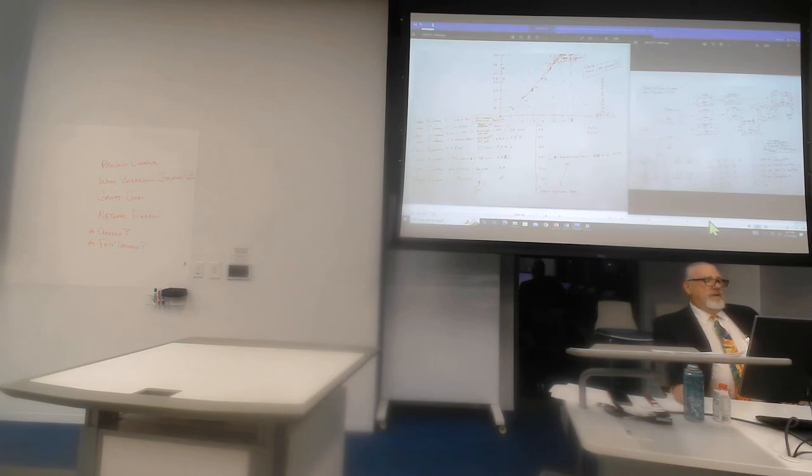Okay. So to crash 2 weeks, it's A and A twice, because we can crash it more than that. And that's $16,000 to do that. So if I were graphing it, to get 1 week off cost me 8, to get 2 weeks off cost 16. Now, when I first did this, I did 3 A's. But what happens if you do 3 A's? If I reduce 1 week A 3 times, I now have 28 down to 25.